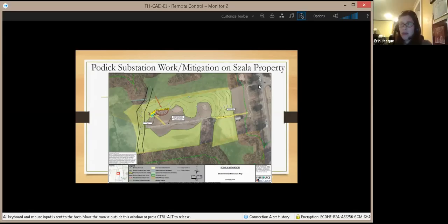Okay. So I can rerun through some of these, but in addition to the specific ones that we're talking about, I definitely would like to include some boilerplate conditions under state and local, like posting a DEP file number, having a pre-construction meeting, those basic ones. The only ones that would be a slight variation from a typical order of conditions would be the long-term monitoring of the wetland, because in this case, I think the town is taking onus of the wetland upon itself as far as monitoring it. So it will more or less just be for construction of it, written into the boilerplate, as well as the other standard boilerplate conditions.